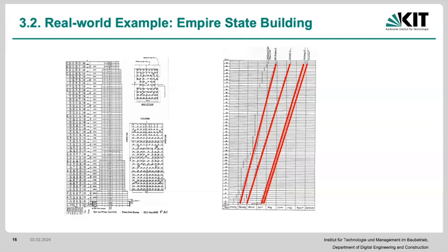So this is how we can actually optimize for the flow, as long as we find a good unit of division, and we would be able to know the production rates, and hopefully if we can parallelize these production rates in terms of optimization, that would be the best possible solution. And then using that, we would be able to optimize the whole duration of the project as well for the different levels that are going to be carried out. Hopefully, especially for repetitive activities, it is going to be fantastic.